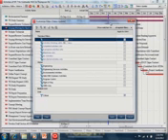He can. Yeah, no, you can. Primavera has the ability to set up multiple calendars where you can set what your work periods are, whether it's a 5-day work week or a 7-day work week or 4 10s or a 24-hour schedule. It can be set specific to an individual project, and actually each individual activity can be placed on its own calendar as well.